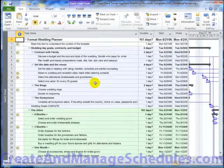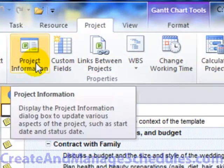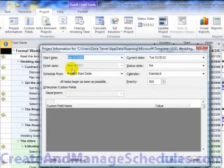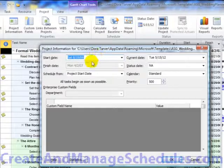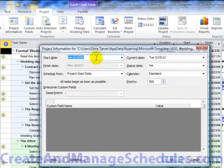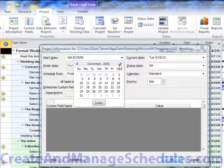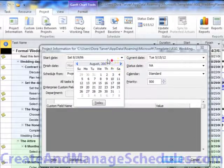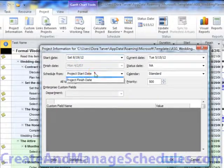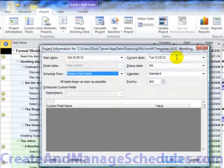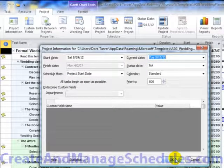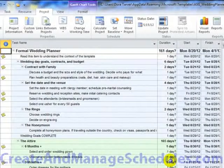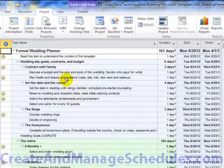And then probably one of the first things you'll want to do is go to the Project tab and go to Project Information and change the start date for this wedding to be whatever your current start date is. Notice this says 2006, so we're in 2012 right now, so that was six years ago. You'd want to change the date to something relevant to your current situation.